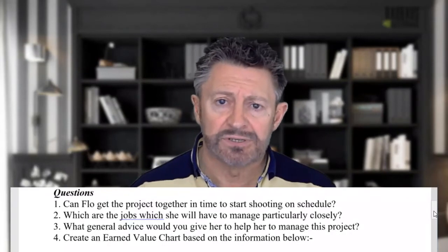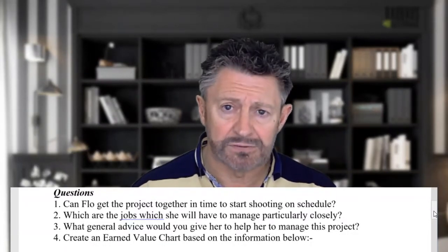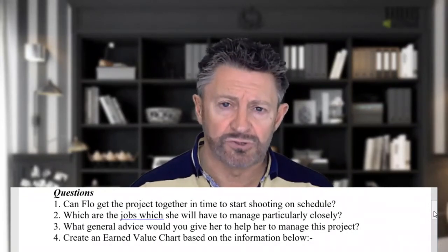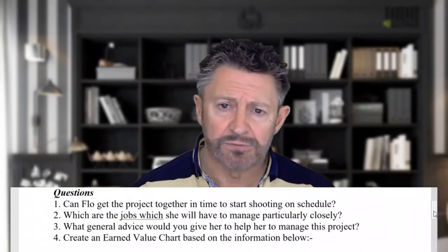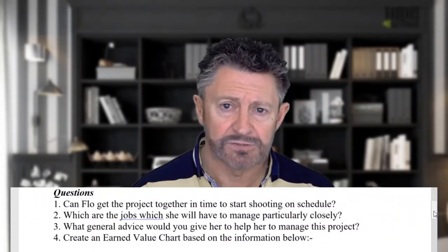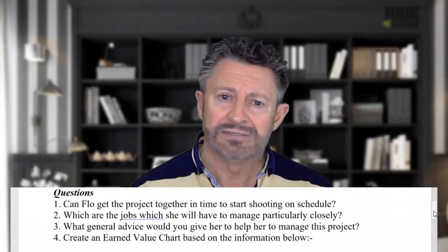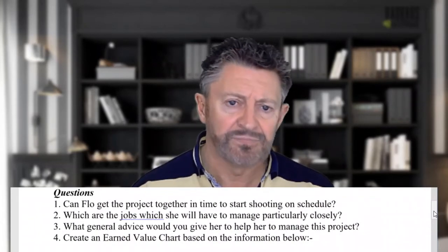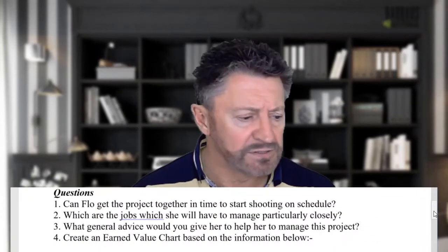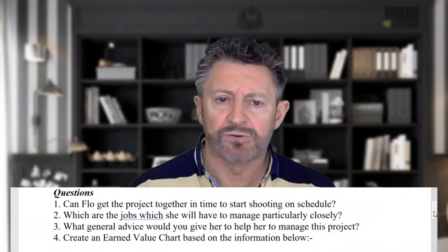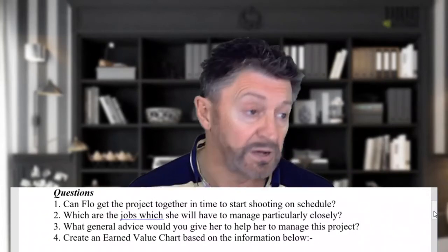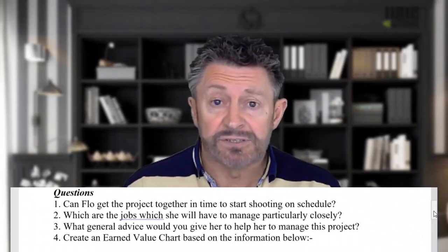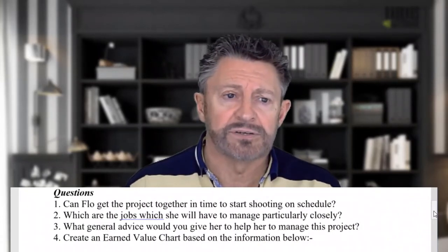Adapt project management methodologies, break it down, phase the projects, and then make sure you have good monitoring and control mechanisms in place, that you have regular meetings, and that you're communicating with people. That's really important, because someone might say, for example, the vehicles might be delayed, and if you're not interacting with the company that's going to prepare the vehicles and do the artwork on them, if you don't follow up and say they were due to be delivered on Thursday evening, are they happy? Did you get the vehicles? And they say they actually came Wednesday, so okay, we're on schedule, we're starting on schedule to do the work.